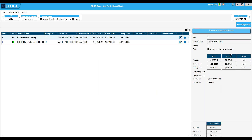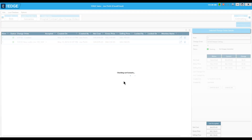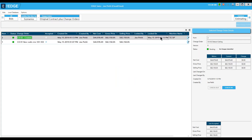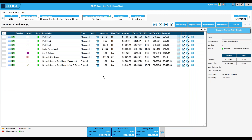Now let's add another change order. I've created it and the numbers are still zero because I haven't done anything to it yet. After I work with it the numbers will change. I check out the change order and move through my project the same way as before. In the condition list, notice that partition 3 — which I added in the previous change order — has now become part of the project. It would not have done that had I not accepted the previous change order. Now I'll go out to the drawing screen.